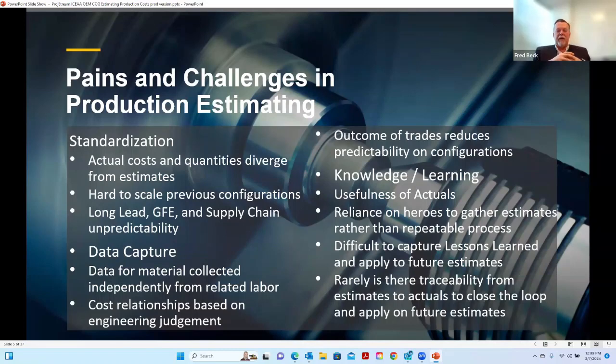And so for that reason, a lot of folks in the industry will develop cost estimation relationships that try to normalize or take that actual data and literally drive a line through it or a curve through it so that you can normalize, use a parametric approach or an analogous approach based on your alignment with actuals to try and minimize some of these divergences. Because as you get more and more data together, it kind of normalizes out.